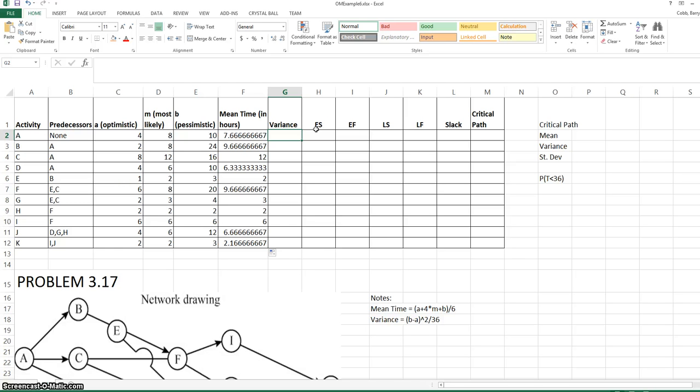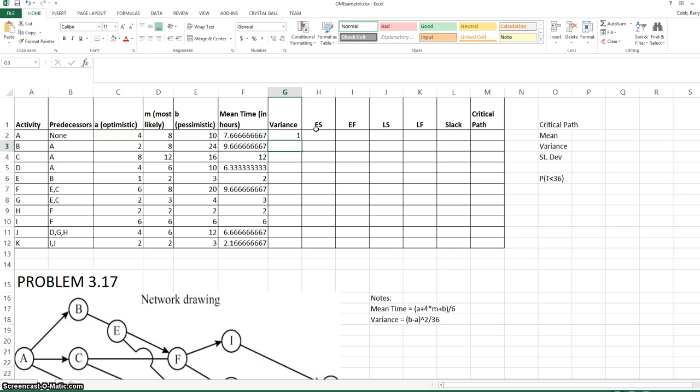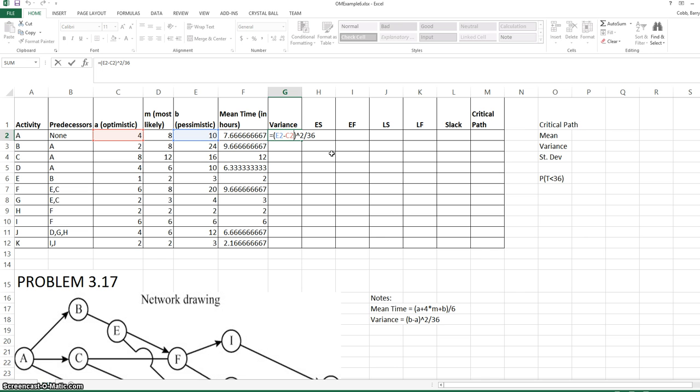The variance of the activity time will be the pessimistic, or longest, minus the optimistic, the quantity squared, divided by 36. Once we enter this formula for the first activity, we can copy this down to the other activities.